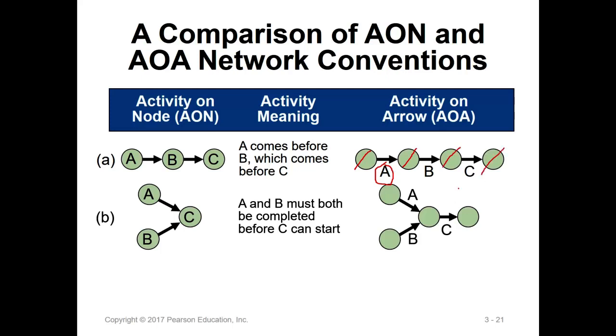In our book, if you read it carefully, they only give the resource and the time at A, B, C. For the event, you just assume nothing happens over here, just a certain point. You do not consume any resources at the arrow. So that's why, somehow, I feel the book doesn't recommend this approach. The book used a lot of examples to show activity on node, because it's clear. A represents the event and activity, and it will be assigned money and resources, and take time to finish the work.